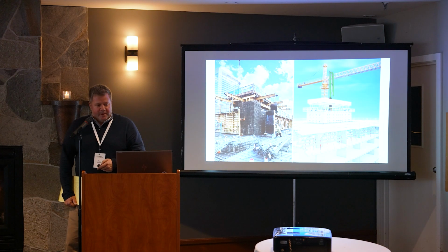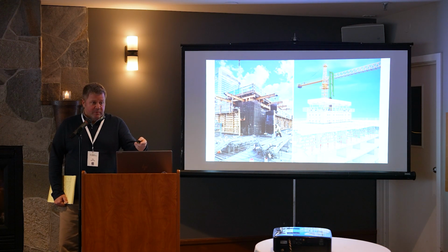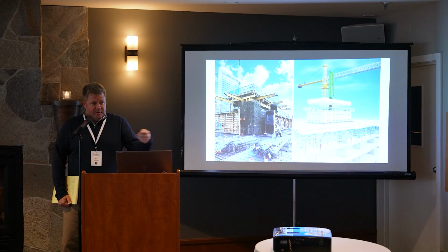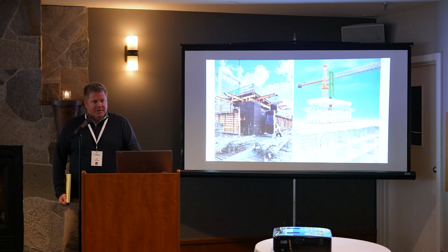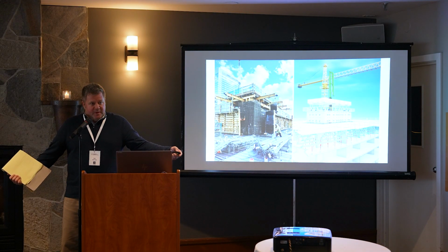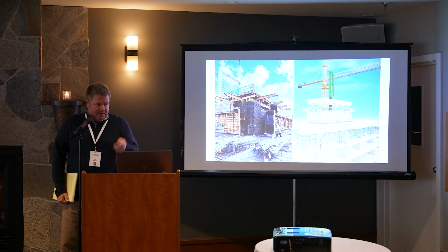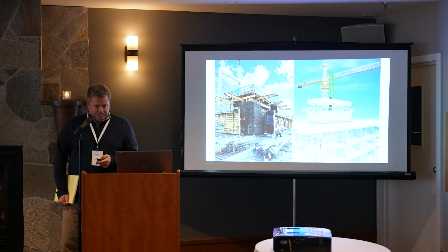Yeah, and I totally agree. You only have so many still shot slides to put in here, but that's been a lot of the way we've been able to use it, both internally and externally, and with some of our other subs. Here's the crane you have planned, here's the radius, here's all the stuff I have to pick, here's how much it weighs. Let's start playing Jenga with it, and how are we going to get stuff in the right place, which I think is what you're talking about. Thank you.